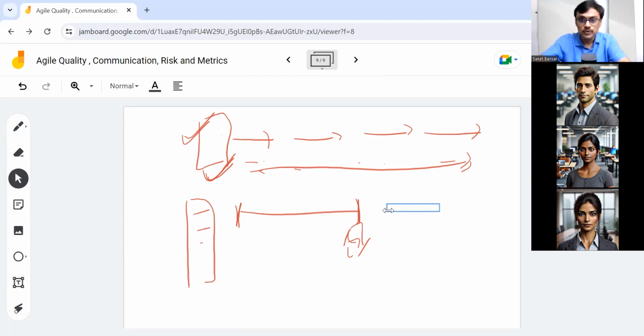In our project management terminology, if someone asks how you do risk management in Agile, we use a term for the PMP exam, Dinesh, whenever you take the exam: organic risk management. We can say the agile way of working does not require a specially documented risk management approach, because evaluating the work every 2 weeks, taking feedback from stakeholders, and evaluating the quality and deliverable every 2 weeks takes care of risk automatically. We expose issues and risks early, and we adapt accordingly. So that's the one term associated with agile: organic risk management.